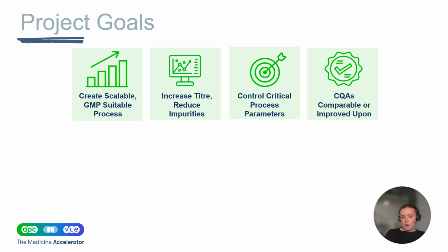So getting in our client data, doing our process development work, and then scaling that to our GMP colleagues over in VLE, having everything in the same place was really important and very, very useful to the team. We used accelerated process development. So we started with the end in mind, looking at manufacturability, our operators in VLE being on the journey with us, and then the procurement of our raw materials and our single-use technologies. So ensuring that everything that we used or planned on using could be used in a manufacturing suite.